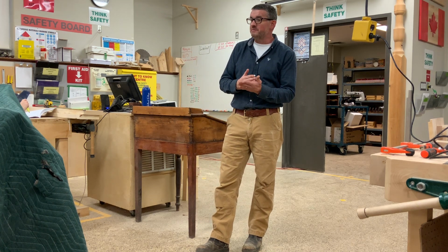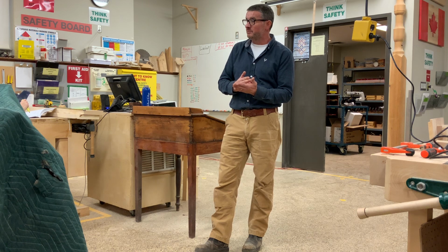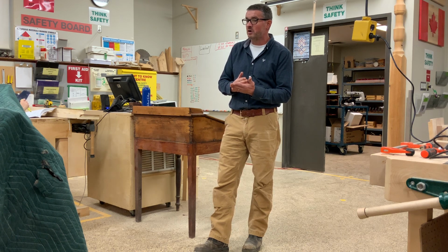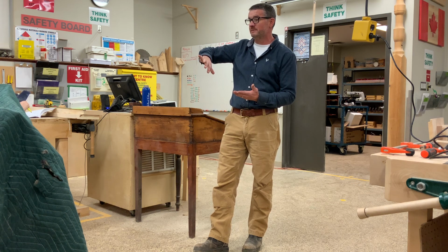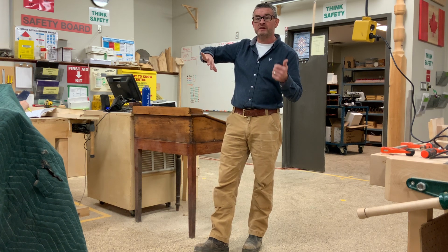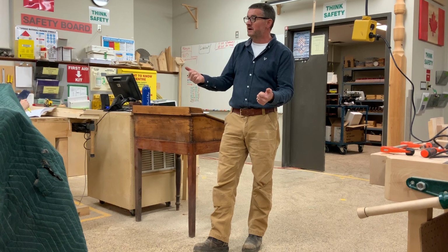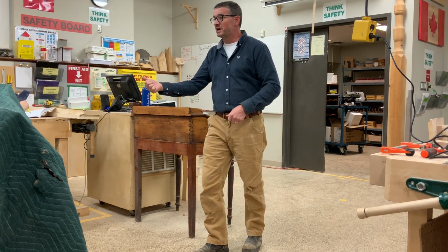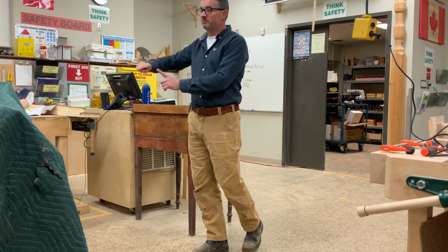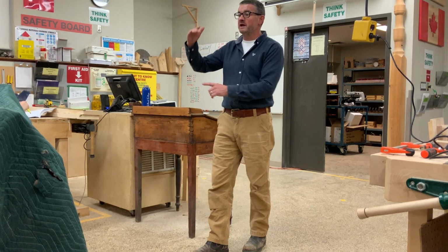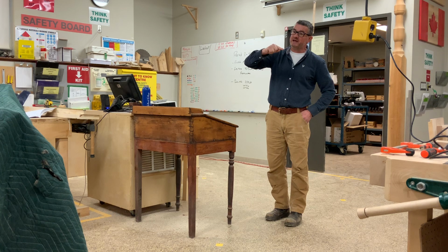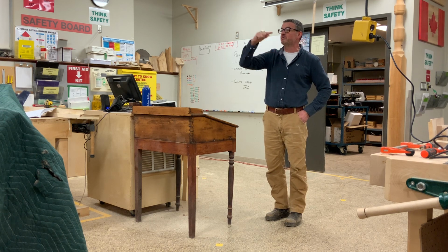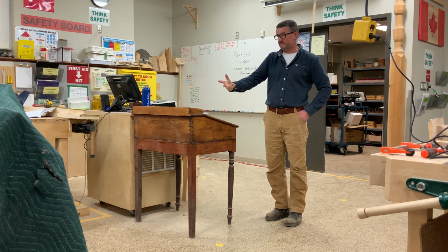The plumber and electrician come, they lay their pipe and their cable into the wall, then we seal up the wall on Tuesday with gyprock. Does that make sense? So if I don't clear this out today, they can't come Monday. If they don't do their job on Monday, we can't put the gyprock on Tuesday. So not only is everything a very finite schedule, but each step is required before we continue to the next step. Does that make sense?